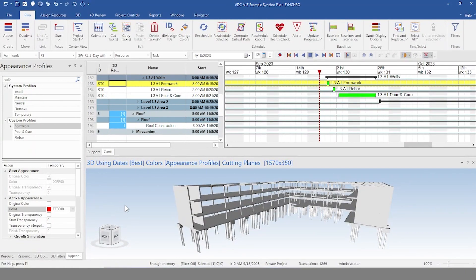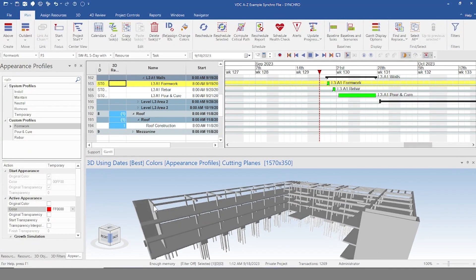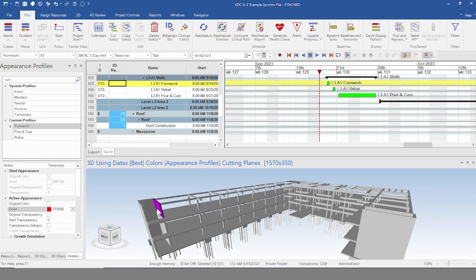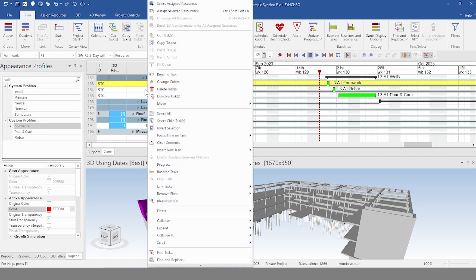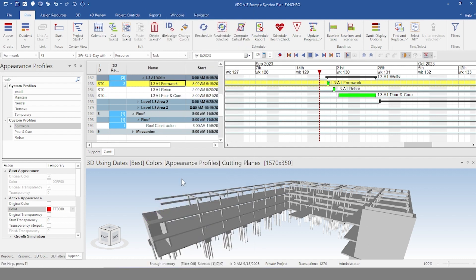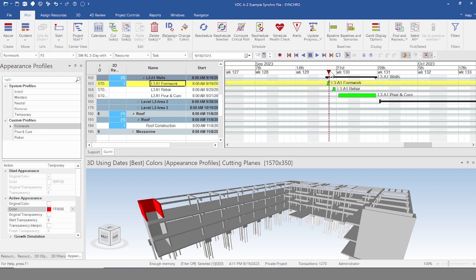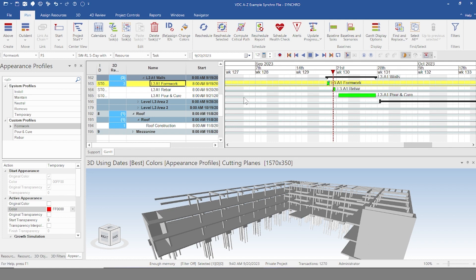So let's start assigning some resources. Click here, our objects in area A, walls on level three. And then I'm going to go ahead and make sure my formwork property is applied. And I'm going to go ahead and right click formwork and assign selected resources. See how they disappeared? That is because we are back here on our timeline. If I move this to where the formwork comes in, it appears right there. And it'll go away afterwards. And then the next one will come up, and it will turn yellow, and so forth.